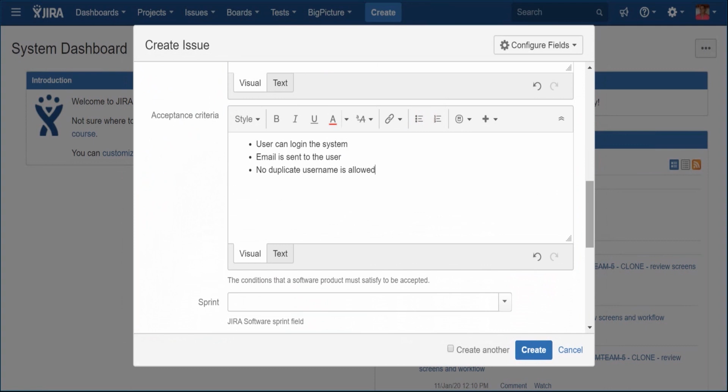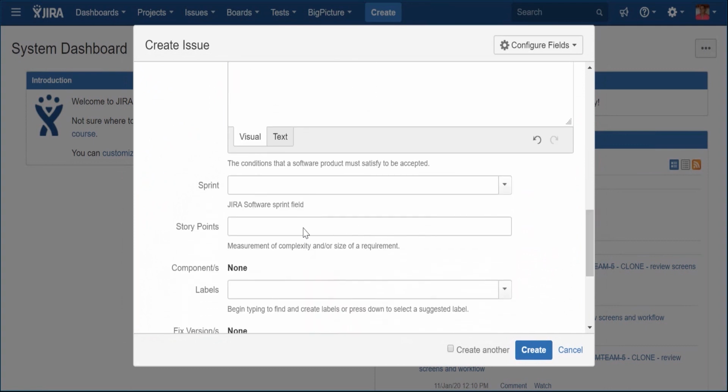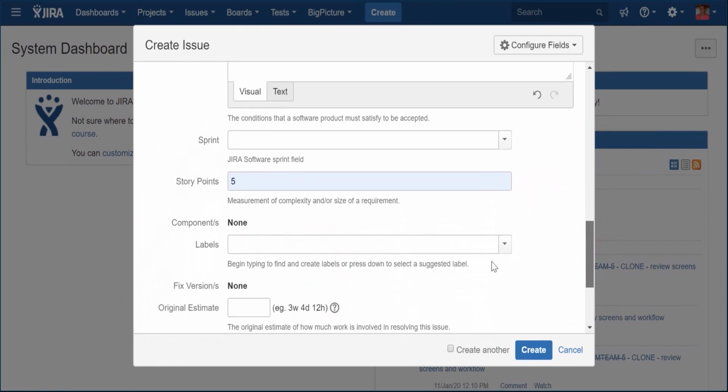The next attribute is the story points, and I guess I can easily say that this is the most famous one, where no introduction is needed. Still, it's worth mentioning that I prefer to use a predefined list with a modified Fibonacci sequence. Using this predefined list ensures some consistency while using relative estimates.